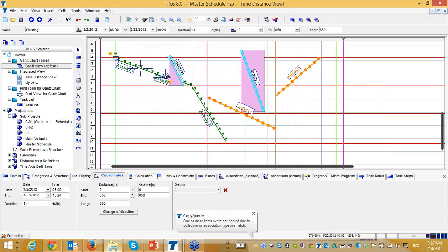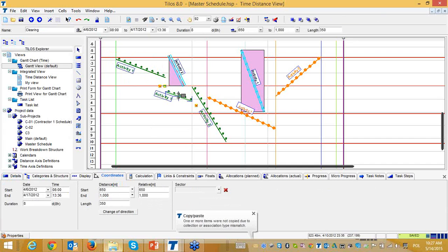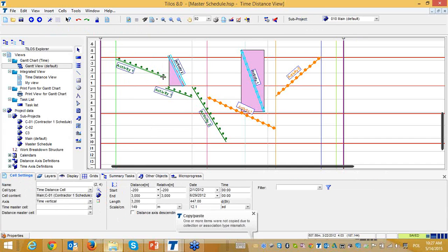As you see now, this is like 2 activities, yes. And I can move only the second part. It was somewhere here, so I don't change the first part. As I planned, I can keep this activity, but here I can say I will wait for this subcontractor, and then I will move after the activity 2. It can be a solution. Of course, this should be done by site managers, project managers or the planners.